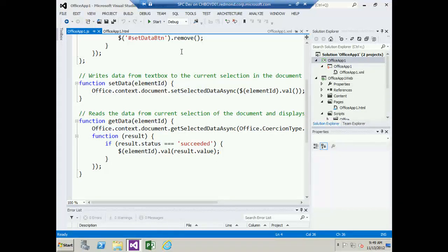So let's say Chris and I are both resources on a project. I have some permits that let me do some work in construction. Chris has some different permits, lets him do other work. And as I'm in Project Client trying to figure out who to assign to different tasks, I need to know who has which permit. And if I wanted to add permits, I could do that right from the client as well. I don't need to go into SharePoint in a browser and see that same information.